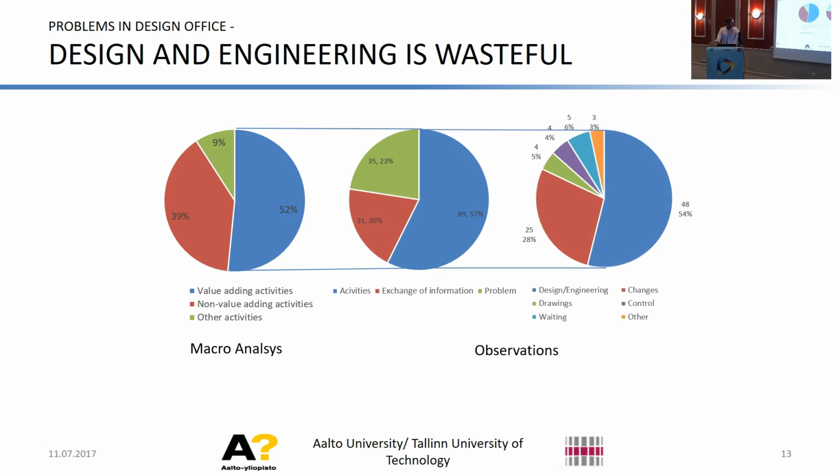And further on, so what's this 57%? You can see that there are so many different things. One would argue, of course, it's not correct and it's not direct. It's very hard to measure the value-adding activity in this design stage. But one would argue that the value-adding proportion is somewhere between 10 to 20%, not more than that.